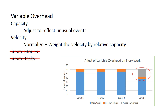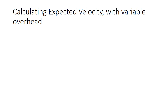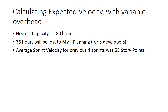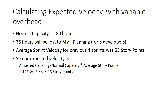Teams want to understand how many story points they should attempt for a given sprint, and to do that we need only account for the variable overhead. Assuming the standard capacity, already discounted for fixed overhead, is 180 hours, and this sprint will lose 12 hours each for 3 developers — 36 hours total — with an average velocity of 58 story points, we calculate expected velocity by taking this sprint's capacity (180 minus 36 hours), dividing it by the standard capacity, and multiplying by the average velocity, which yields 46 story points.